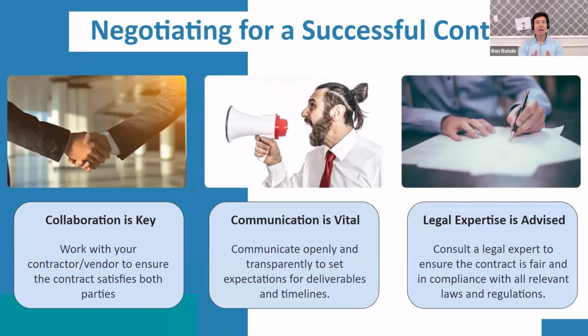Communication is vital. I have a lot of issues where I get contracts and it doesn't specify the number of reports or updates or photos or videos or specifications or what's been delivered. And it's very, very frustrating for my clients that they have this contract and they just don't get any updates. So where are the trusses?